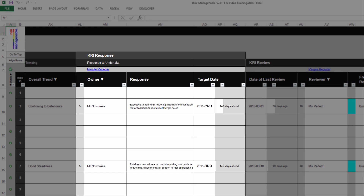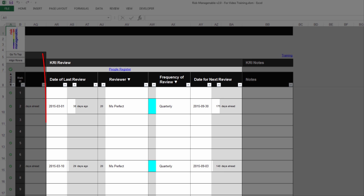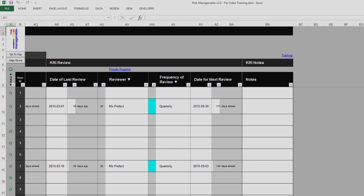The section KRI Response is where you record information regarding the response to undertake to address the KRI, along with its owner and the target date. The section KRI Review is where you record the key information related to the regular follow-up of the key risk indicator: the date of last review, the reviewer's name, the frequency of review, and the date for the next review.